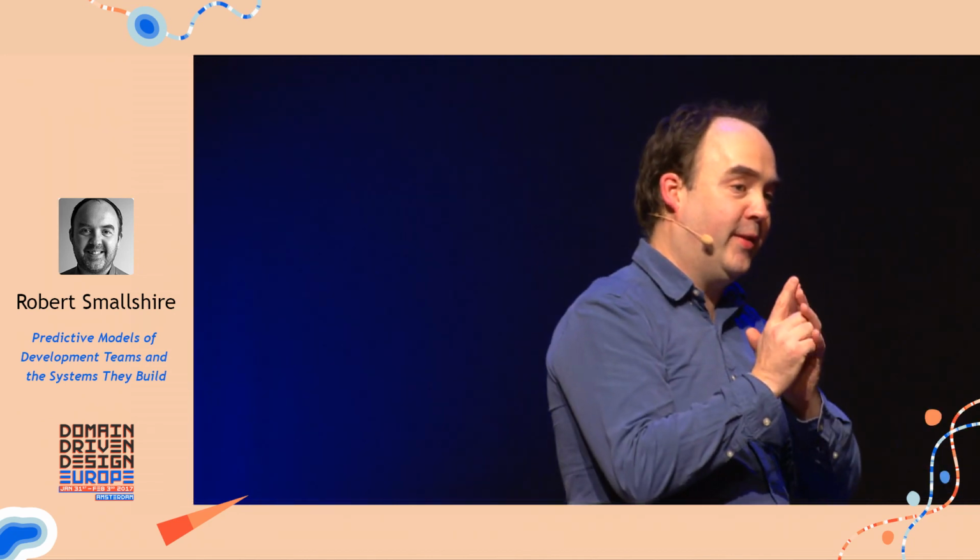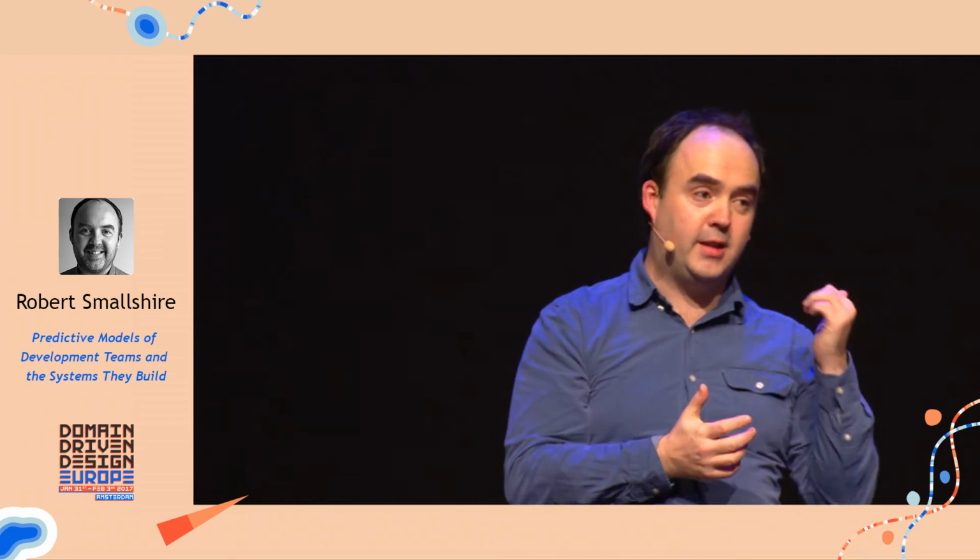Of course, the question that needs to come after the question you just asked is, when should you add people? At the beginning or at the end? I don't have the slides to show it today. You need to download the model and play with it, but there are some very counterintuitive answers to that. Because if you add them right at the end, in the limit, at the very end when you've already finished, it has no effect, of course. So adding them very late in the project has no effect. Adding them very early in the project is great. So then the question is, what is the optimal time to add them? There is an optimal point you can find, and you can use a simulator like this to find that.